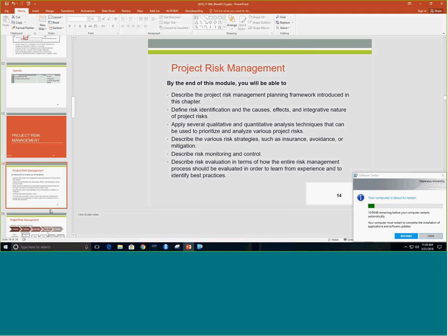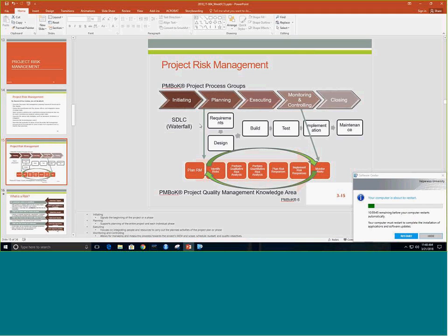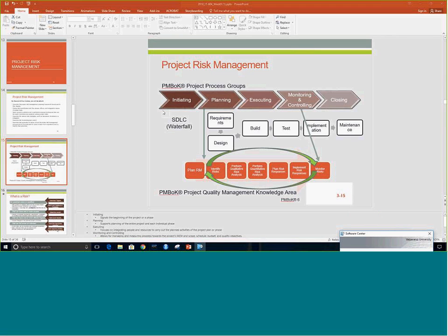The next thing to look at then is our risk management process, which is part of PMBOK 6 that was updated here. In terms of monitoring risks, before that it was called control risks. We plan risk management at the beginning of a project cycle. That means we try to figure out how we are going to attack our risk management process for this project. When are we going to meet? How are we going to track our risks, and so on, right?